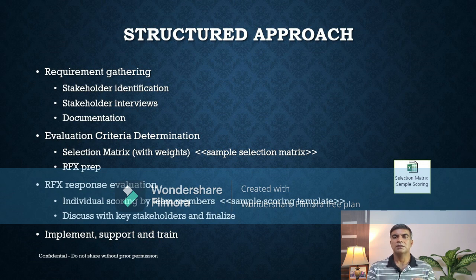Once you have that criteria defined, then you will take that criteria and put it into your RFI or RFP template in order to ask your suppliers specific questions, to understand how each of these suppliers scores against those criteria. And I will share a template with you in a little bit to understand this point better.